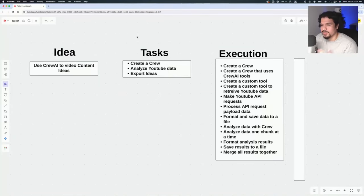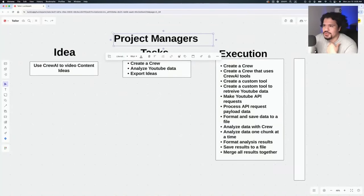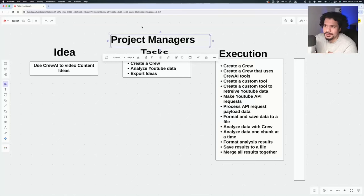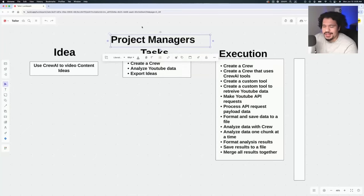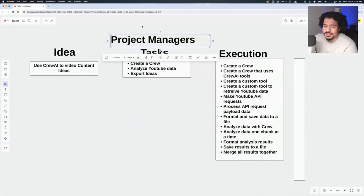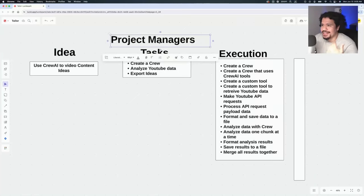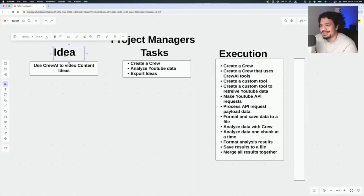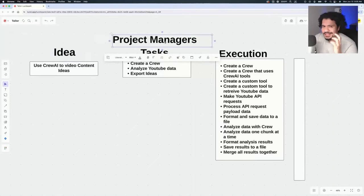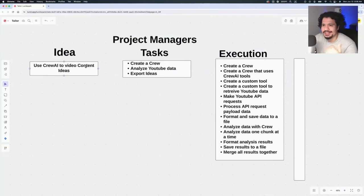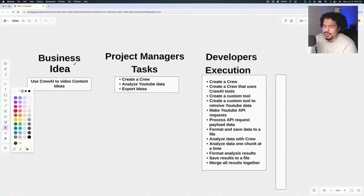Maybe that seems a little bit silly to you right now, or maybe it doesn't make a lot of sense. But in the tech world, there's literally job roles dedicated to this. What project managers do is whenever the business makes a request for a certain feature, whether it's Google wanting a specific new feature on their Google Docs or Facebook wants to add a new button to their Facebook page, or whatever tech company has developers working for them, the business doesn't go directly to the developers and say we want this feature, boom, get it done. No, they go to the project managers. It's then the project manager's job to take this idea that the business is giving them, or rather this business request, and they take this big idea and start breaking it down into actionable tasks. What are all the steps that the developers are going to need in order to finalize this idea or business request?